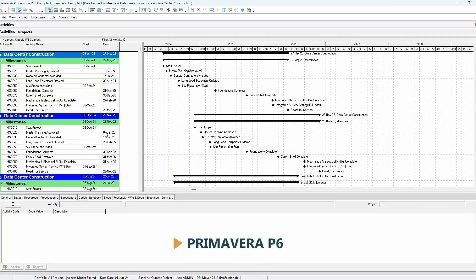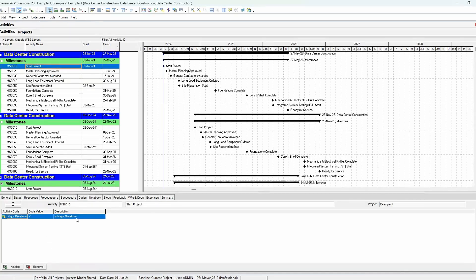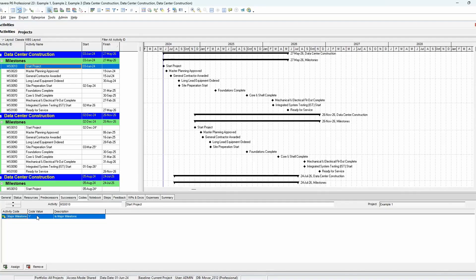Here in Primavera P6, you'll notice a couple of those standard milestones spread across three example projects that I created. If we click on one of these — like 'start project' — you'll see that I have an activity code labeled 'major milestones.' Every single 'start project' activity is labeled MS0010, has the same name, and has a major milestone activity code. So if you were going to pull all this data in the system, it's essentially a spreadsheet on the back end — you can very quickly identify start project, the major milestone code, and the activity ID. It gives you a lot of flexibility.